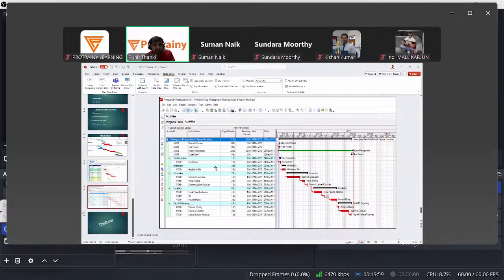So see, foundation work is the predecessor activity of installation of centrifugal pump. I want to install a centrifugal pump. The foundation must be concrete, robust foundations are required. So this is the predecessor activity. Installation of pump is the successor activity.